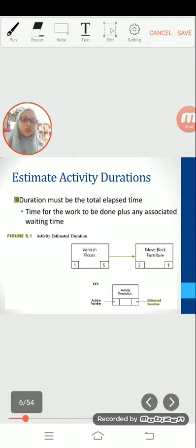This is important to designate experienced individuals to estimate the duration for all activities for which the organization or subcontractor is responsible in a large project. Okay, historical data can be used as a guide in estimating the duration of similar projects. Estimated duration should be aggressive yet realistic. Inflating estimated duration in anticipation of the project manager negotiating shorter duration is not a good practice.